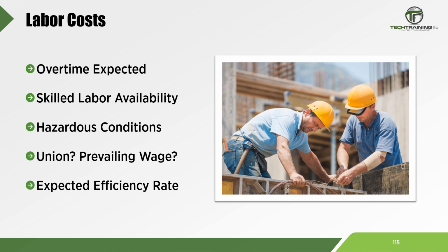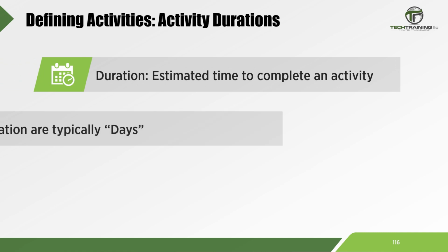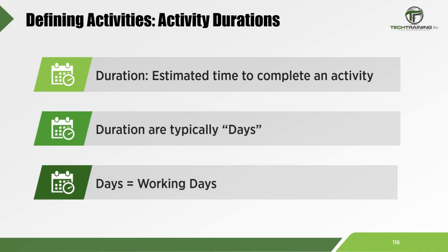And what is the expected efficiency rate? This information will greatly assist in setting the schedule. And time is money. So let's finish this presentation by taking a look at crew efficiency and how to tie that estimate to a construction schedule. In many cases, estimating is tied to a schedule through a crew's efficiency. This is done by assigning the durations for the activities.